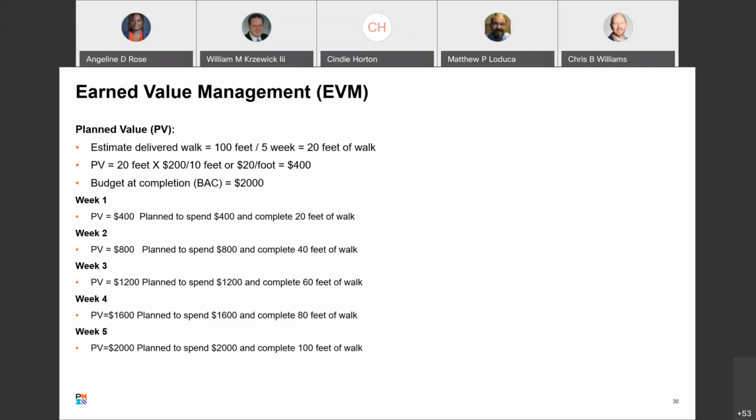Yep. And one of the other things too is not just remembering the formulas, it's remembering which formula to use when. Again, a pervasive issue: you're going to use CPI to calculate your estimate at completion. And if it's a one-time thing, if it costs you $100 more this work period than normal, and you calculate using CPI, you're assuming it's going to cost you $100 more every work period, when that might not be the case.